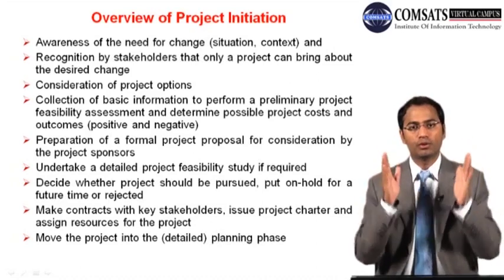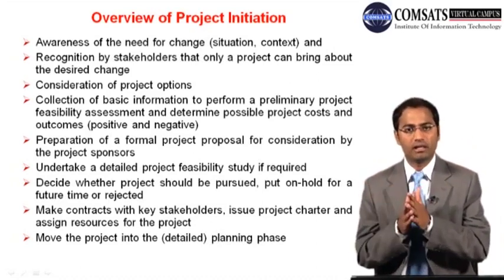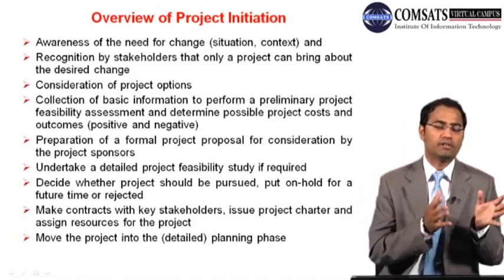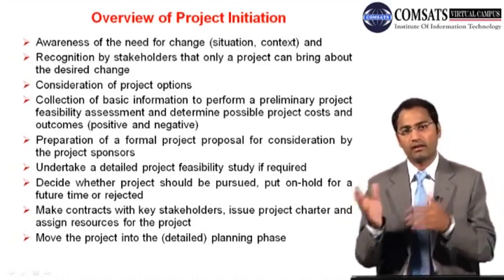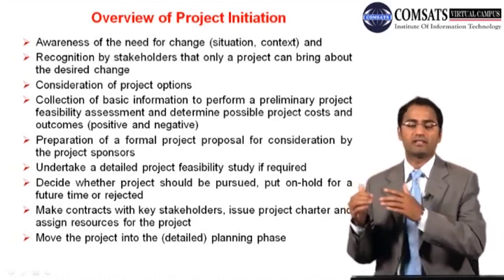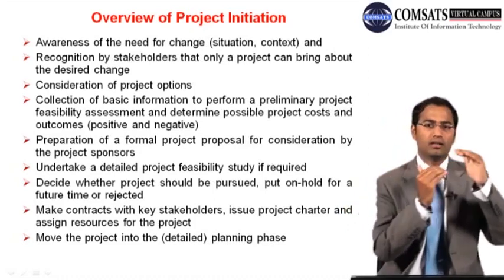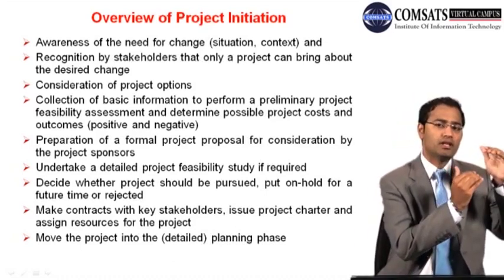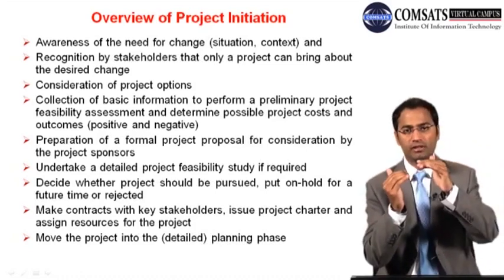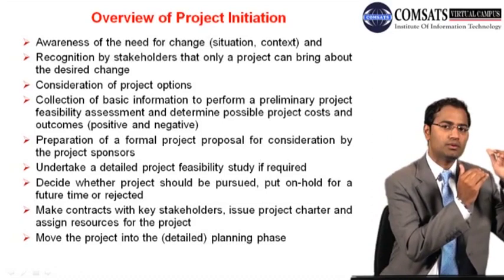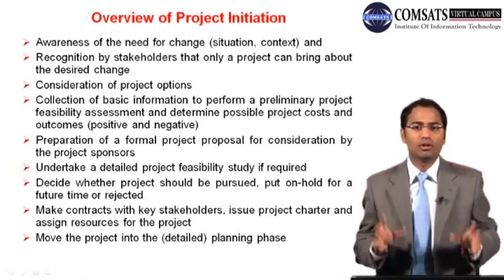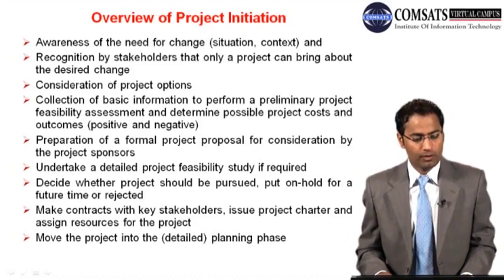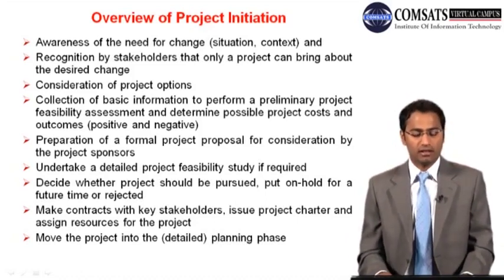So then you have done the study, pre-feasibility or feasibility, and you have done data collection and stuff like that, and then you presented it to the stakeholders. There are a few parameters. If we do this, this will happen. Sensitivity analysis: if the bank rate, like the interest rate, has decreased to 10%, our profit will be this much. If the interest rate has decreased to 8%, our profits will be this much. So keeping this in view, you prepare a feasibility study so that your stakeholders or your senior management can accord the approval.